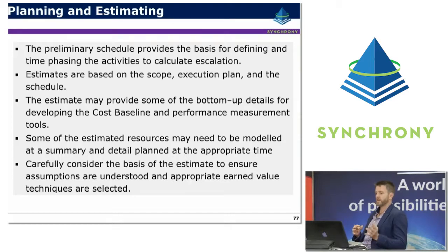So the estimates are based on the scope, the execution plan, and ideally they should be based on the schedule as well. So the estimate might provide some of the bottom-up details for developing the cost baseline and the performance measurement tools, but it's fairly common for the performance measurement baseline to not be in the same level of detail as an estimate. The estimate might be broken out into further detail. It'll typically be rolled up into those control accounts.